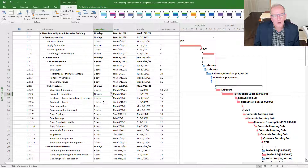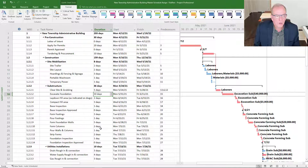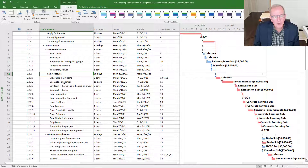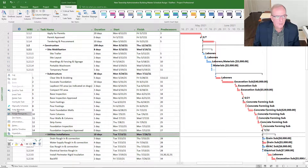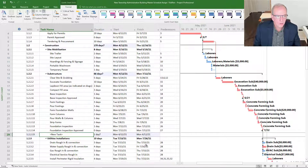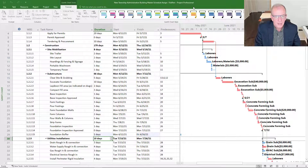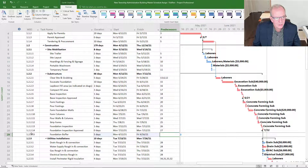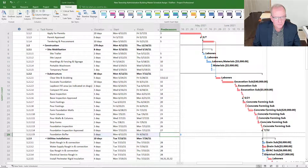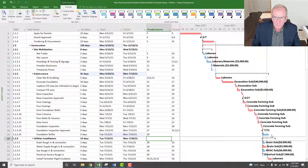A better way, although it requires more transparency, is to make it visual — to just say it's a buffer at certain points in time. For example, under a heading like 'Substructure,' if you want to include a buffer for that area of work, you could insert a row above the summary task and call it 'Foundation Buffer.' You could say I want to allocate a five-day buffer, so I put in five days as the duration. You would then link it to the last task in that grouping — foundation inspection approved — and connect task 28.